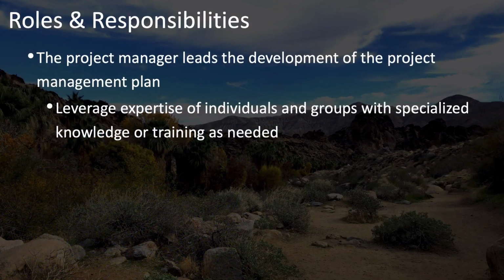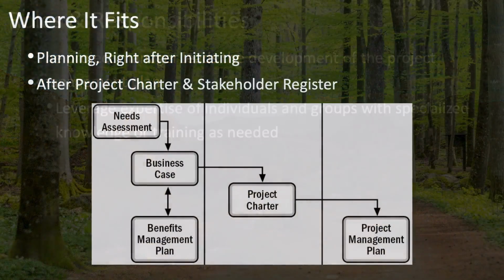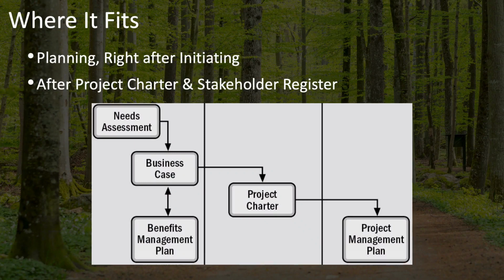As the project manager, it is your responsibility to lead the development of the project management plan. You can delegate different components to different individuals and groups that have specialized knowledge or training as much as you need to, but you cannot delegate the overall responsibility for leading the development of this plan. The project management plan is developed during planning, right after initiation, in which the project charter and stakeholder register are created.